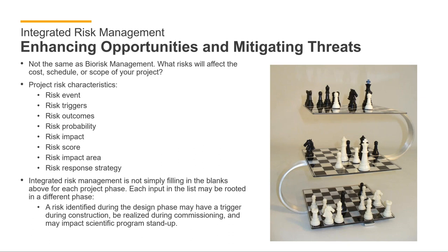A risk probability is a number that's typically on a percent scale with a limit of 0 or 1 on either end of the risk. A risk cannot have a 0 or 1 probability, or a 0% or 100% probability, because naturally that means it's no longer a risk. It's a reality or a certainty.